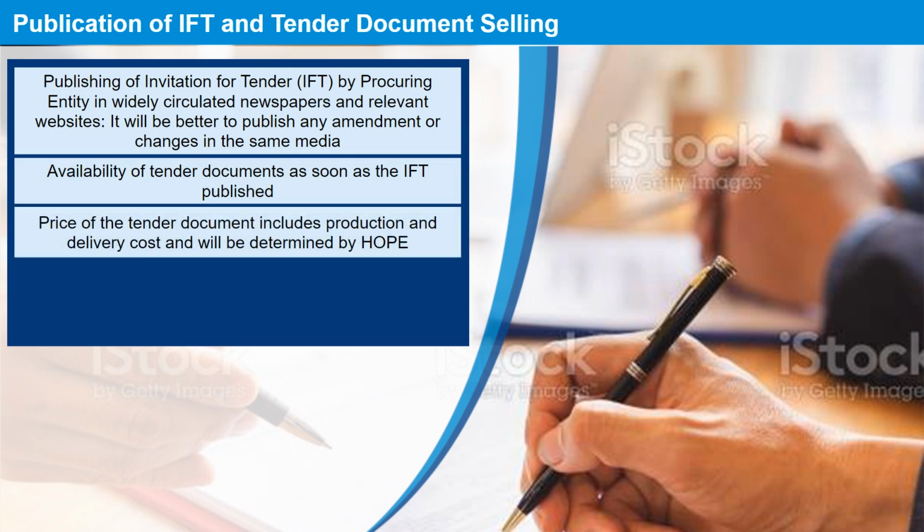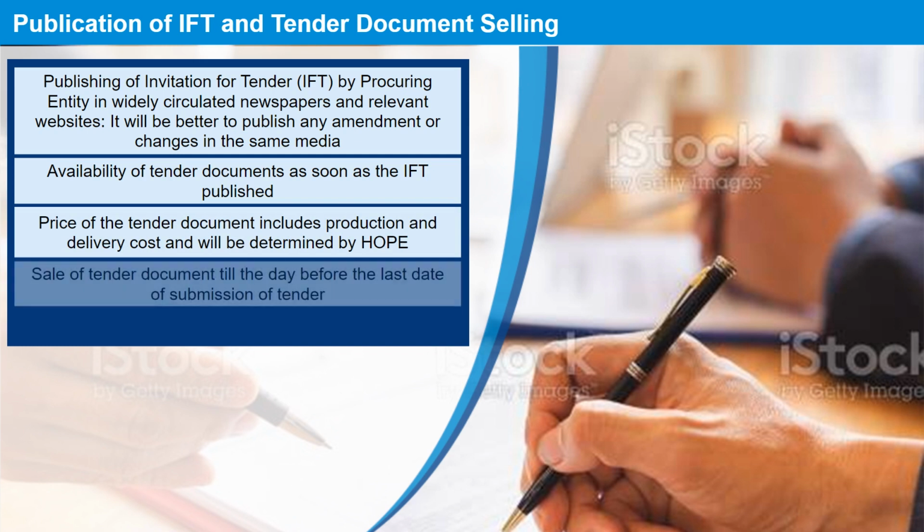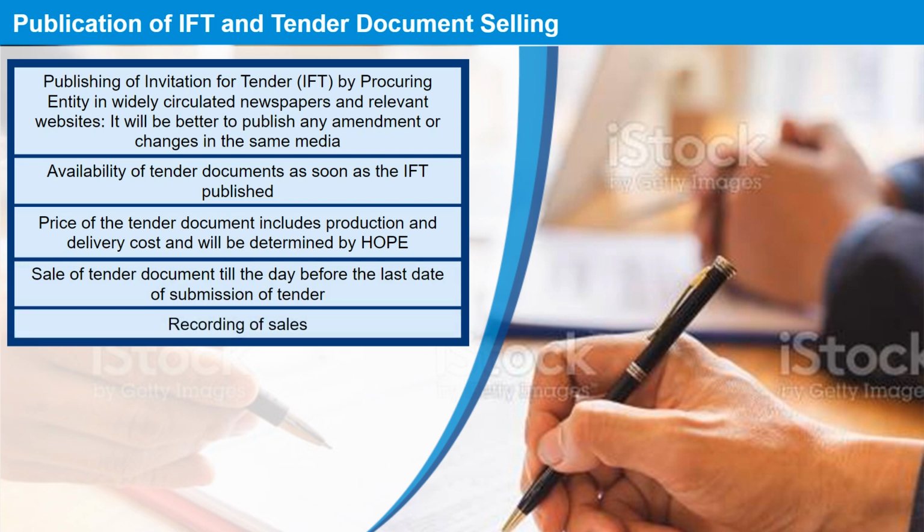The price of the tender document includes production and delivery costs and will be determined by the procuring entity. Sale of tender document will be till the day before the last date of submission of tender. The last step is to record the sales.